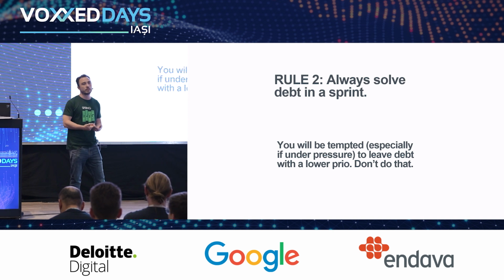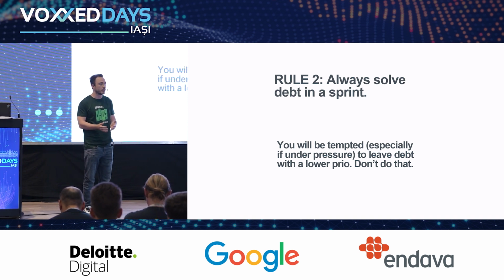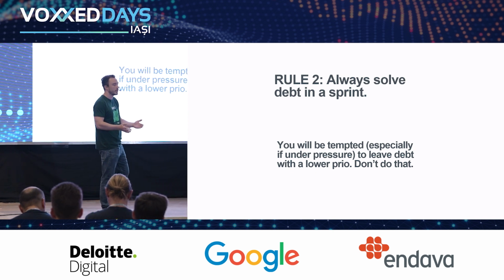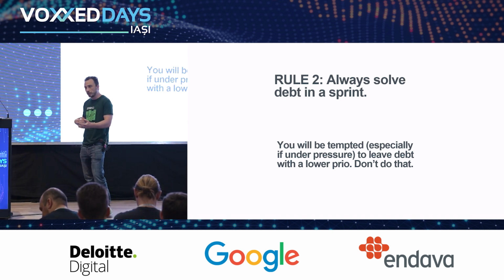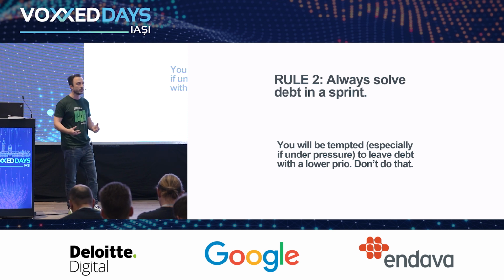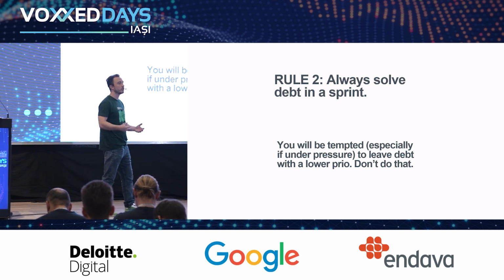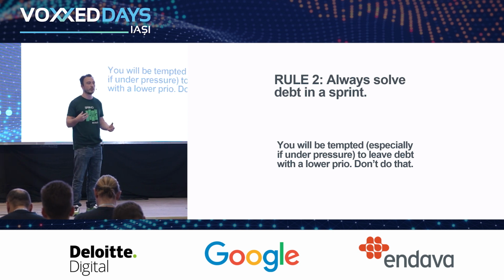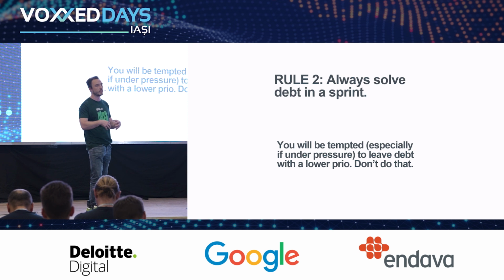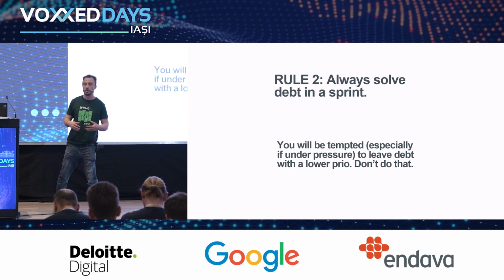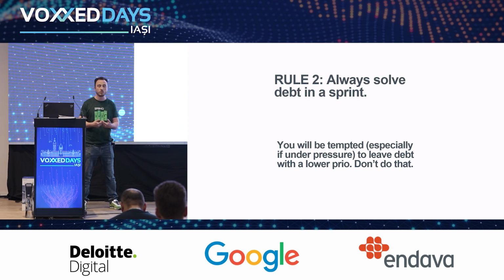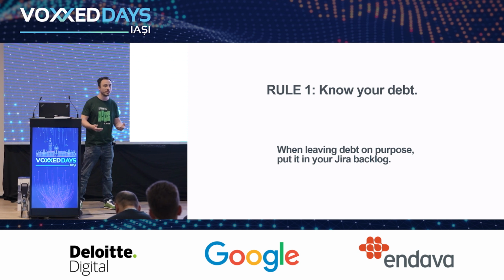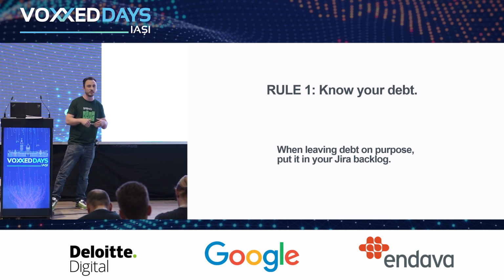If you don't take the time to do that, the systems, again, will be affected by entropy. And that's the world we live in. You can't stop that. The only thing you can do is address it. So change your mentality, change your ways of working, put in the definition of done not only solving business things. Don't agree with your stakeholders in your sprint on only business implementation: I click that button, something happens. You should continuously address also non-functional things, and especially things that are related to technical debt, which, according to rule number 1, you know because you kept it logged in your product backlog. No?